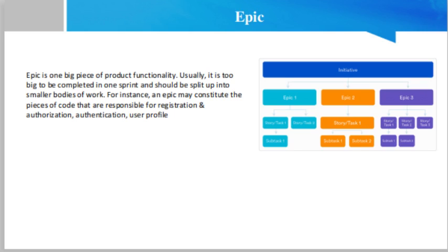The functionality of a product is decomposed into epics in order to estimate the time and budget outlay required to complete the aggregate project, organize the work of a coding team, and identify the chunks that are of the highest priority. It is also more convenient to discuss the product at a higher level, for example, with stakeholders with no technical background. By looking at it as a set of epics, it is also easier to track progress and control the overall development process, if you know what epics you are working on and how much time the overall implementation of the features will take.